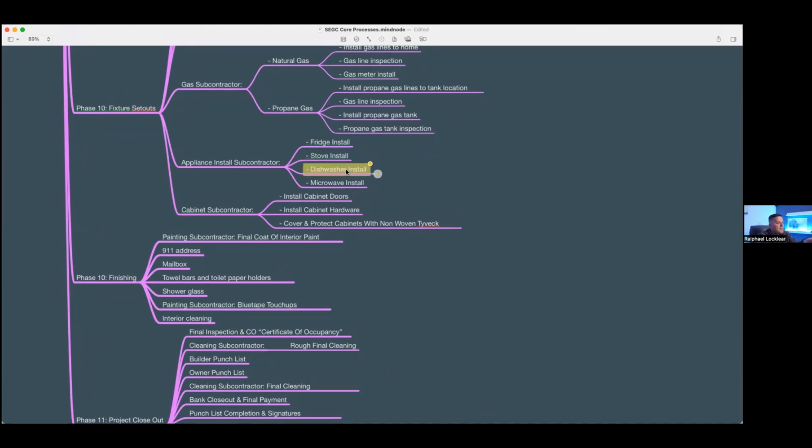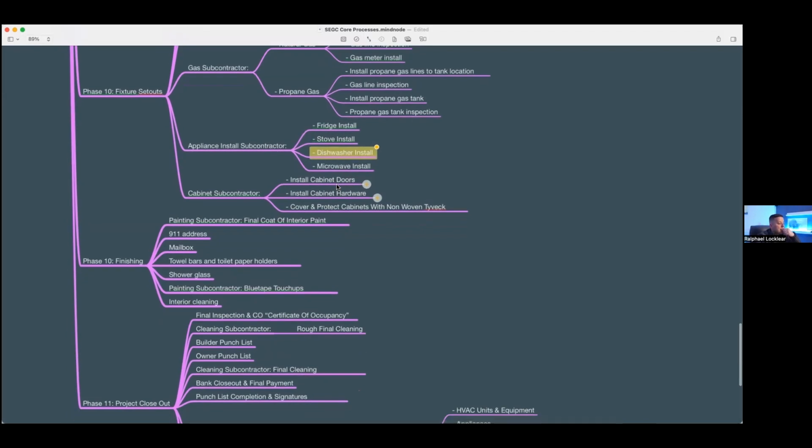And before he sends off his invoice, I tell you, make sure that all this is done. And then you need to sign his checklist and send it over to billing before he gets paid. Now, if we had an issue with the fridge install, stove install, microwave install, and we documented what those issues were and recorded explainer videos, so now anytime anybody new does that install again, they watch that video training and then verify all that stuff is done, what's the chance of us having repeatable problems that we've had in the past?